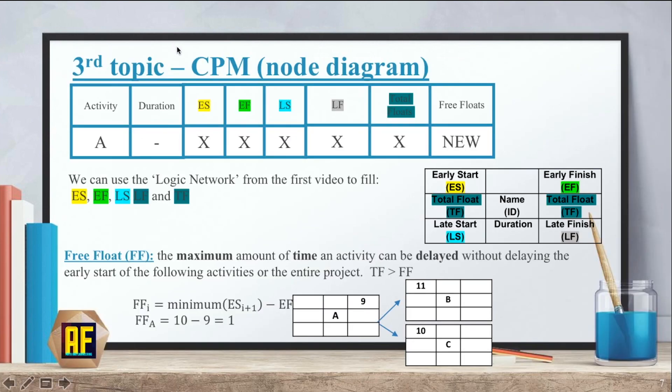Our next topic, which is also CPM, is the node diagram. We basically took the logic network and transferred it into a diagram. We had the activity, duration, early start, early finish, late start, late finish and total floats. And we had another new concept called free floats. And basically we can take our three by three square and set the numbers over here. Once we finish setting everything in the node diagram, we can calculate the free floats.